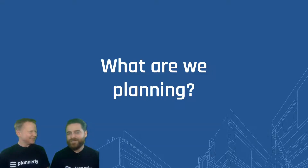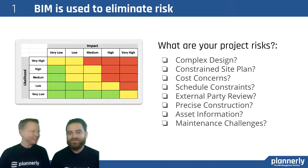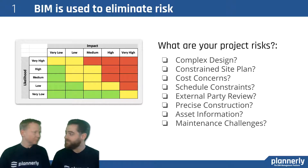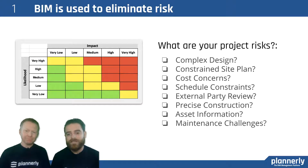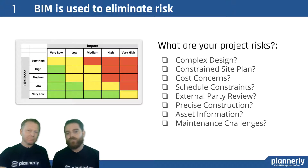But what are we planning? We're doing BIM — we've talked a lot of project management speak, but what are we really planning for? With BIM there are a lot of uses, but to really align your uses you've got to eliminate some of the risk. For example, you might want to use coordination for a building with a very complex design — that's one of the most common uses. You might want better quantities for more accurate costing, or maybe facilities requires a lot of information for asset information. So aligning those expectations and uses from the very beginning really helps with the following steps to create the BIM execution plan.